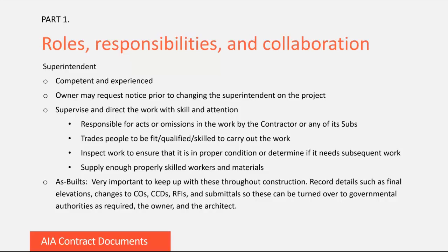However, the contractor may choose to relocate the superintendent to serve its business interest. Be aware that an owner may require notice before you change superintendents, as well as give its consent, just to discourage cycling through superintendents and losing each one's knowledge about the project. It's important that the superintendent direct the work with skill and attention. This would include, among other things, being able to plan, prioritize, organize, carry out a schedule, and coordinate manpower.